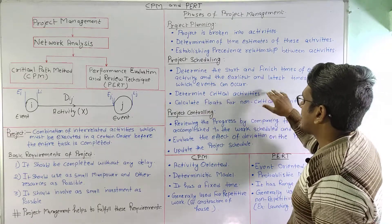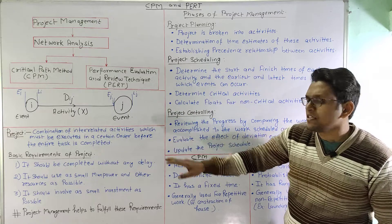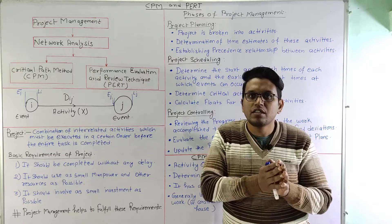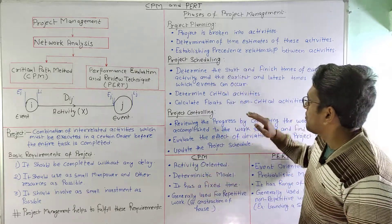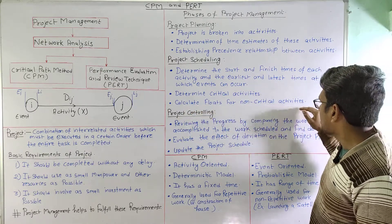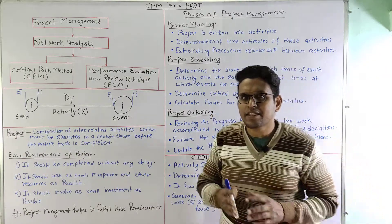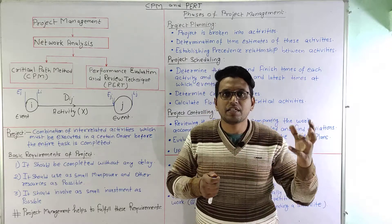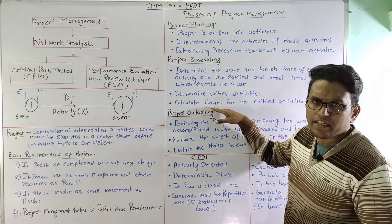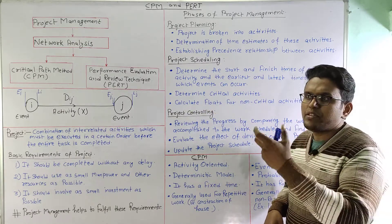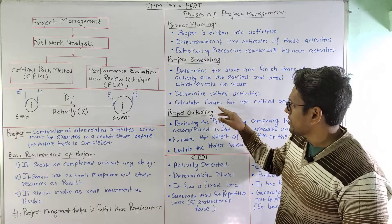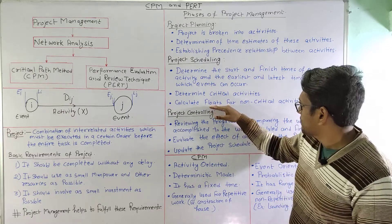Next, we determine the critical activities. Critical activities are those where delaying any one of them will delay the overall project time. We then calculate the float for non-critical activities. Floats are the time by which an activity can be started early or delayed. For a critical activity, the value of float is zero — critical activities cannot be started early or late. For non-critical activities, we have a certain value of float, which we will calculate in further lectures.